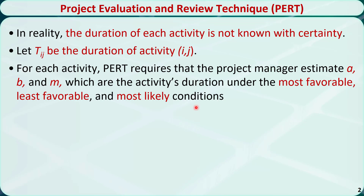PERT requires that the project manager estimates each activity's duration under three different conditions. A is the estimate of the activity's duration under the most favorable conditions. For the house building project we talked about in previous videos, the conditions can be: the weather is always sunny, it's not too hot or too cold, and construction materials can be delivered to the site quickly, and so on.